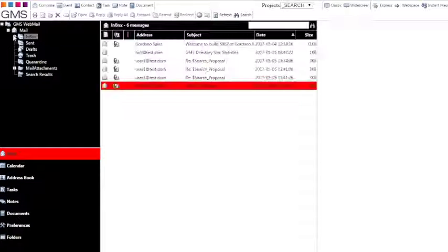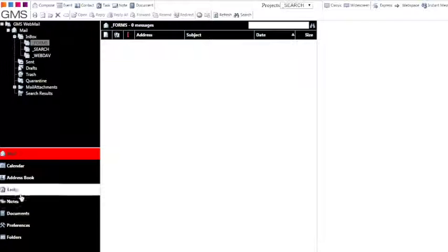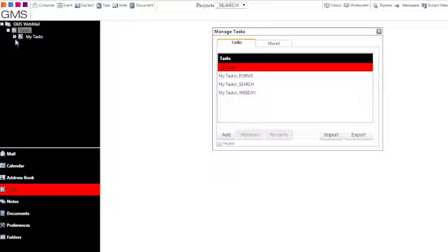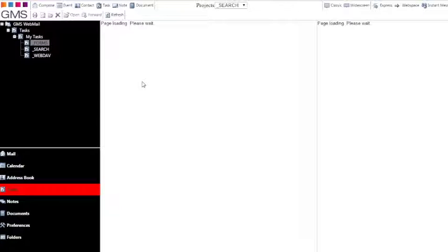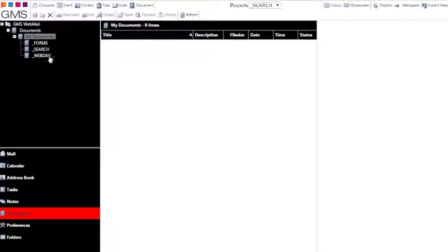Proper project folders are created for the project manager and for the team members, which is mail folder to auto-store incoming emails for the project. Project folders, which we just created, will be shared with the team members, and a shared document folder owned by the project manager, which is a central repository for the project.